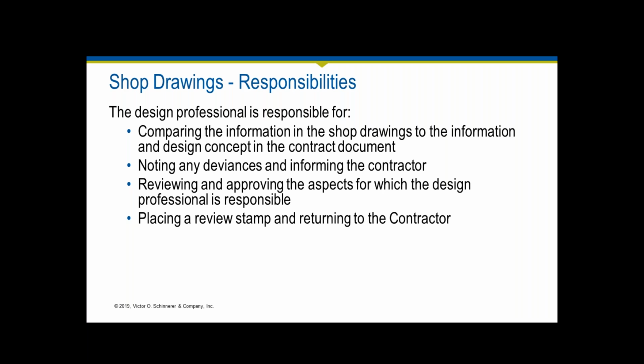Especially at the beginning of the job, if you insist on the contractor following the protocols that are required of them, this generally helps everybody get on the same page. So especially at the beginning of the job, you want to let the contractor know, hey, these are your responsibilities. It doesn't look like you have coordinated this with your other subs or with the design concepts. Please review and resubmit. If those expectations are set correctly at the beginning of the job, then as the project progresses, you have a chance of actually having a process that is fairly efficient and works well. If you don't take the opportunity to establish that at the beginning, then it becomes more problematic as the job goes on, because the contractor has gotten away with not adhering to what is expected of them.